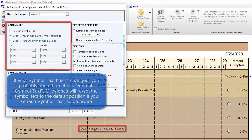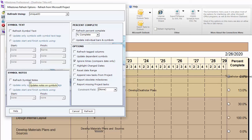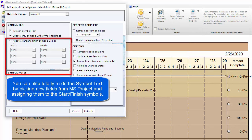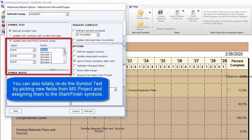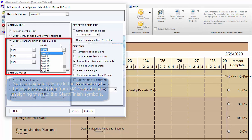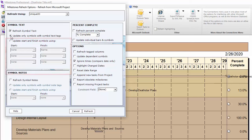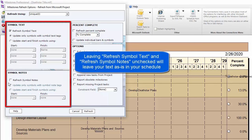Refresh Symbol Notes works the same way. Something interesting with both symbol text and symbol notes is that if you want to totally redo how symbol text or notes are set up, you can choose the second option. The first option just brings in text to wherever it was set on the original import. The second option lets you actually change what text comes in — so if you accidentally brought in the name field and want to bring in a text field instead, you can set that there. The same option is available for symbol notes.